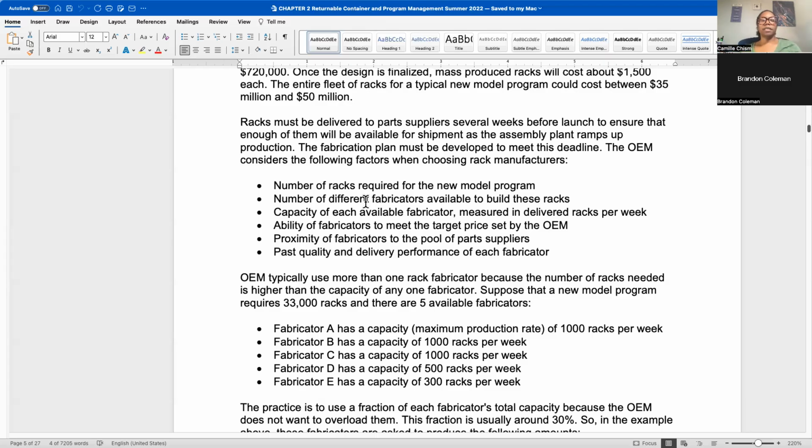So what they do is they say, okay, let's say we get 100 in, right? So they start off with 3 days' worth ahead of time, or they get a week's worth. They get maybe 150 racks because let's say they use 30 a day. And then to get up to that 1,000, they'll start bringing in enough for each day.